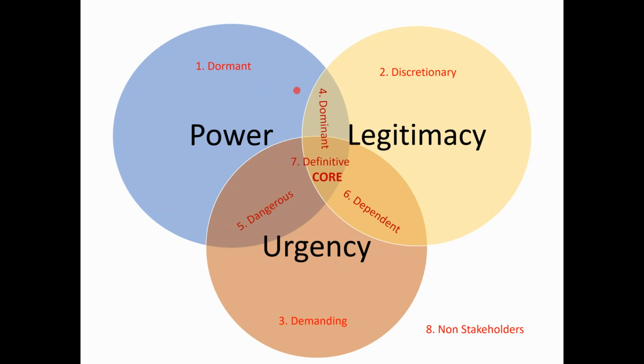Now let's talk about a stakeholder with power and legitimacy and no urgency. This is a dominant stakeholder.